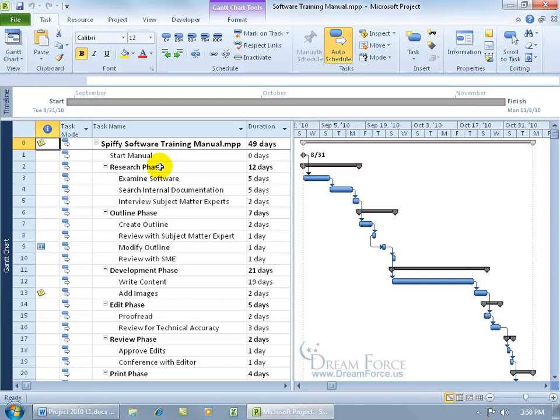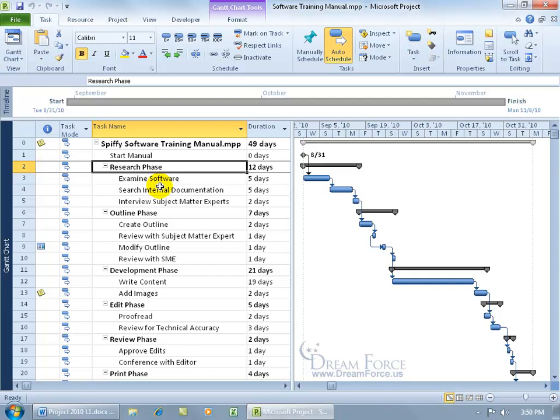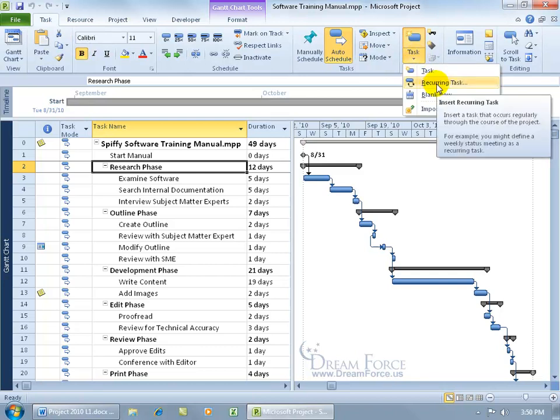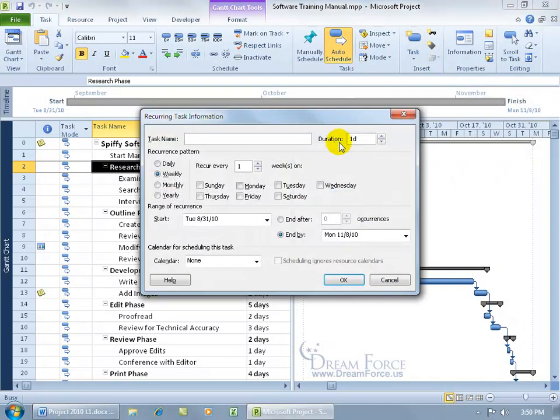To go ahead and insert that recurring task, let's say above my research phase, I'll go ahead and select that task, then come up here on the task tab to the insert group, click on the task drop down arrow, and there it is. Click on recurring task.